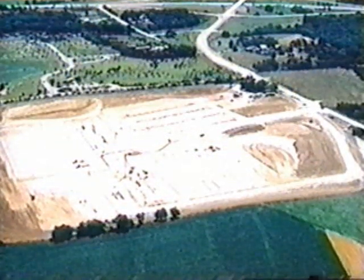In addition, a 250 car and bus parking lot would be built, and a parking area for 18-wheelers would be added later. By the middle of summer in 1996, the land was graded, the pilings were in, and steel was ready to start coming out of the ground.